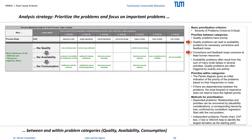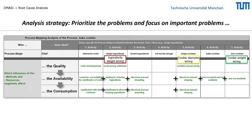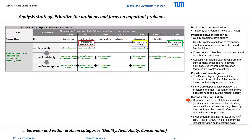Solving the quality problem would thus increase the availability and decrease the consumption of human resources. The same applies to all other error corrections. These problems are therefore interdependent. However, solving the quality problem alone does not lead to a complete solution of the availability or resource problem. Availability problems often result from the sum of many small delays in several activities, while quality problems are often triggered by exactly one activity.